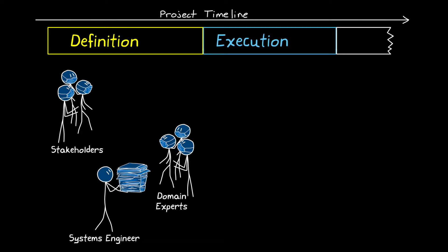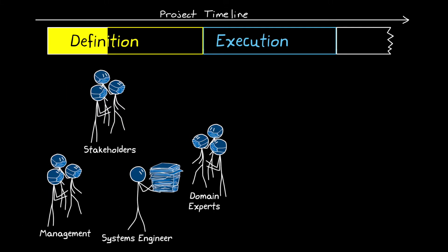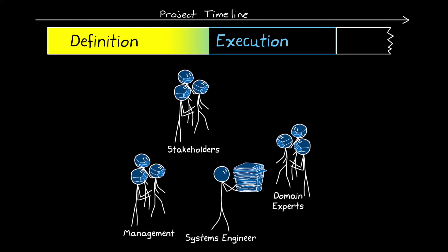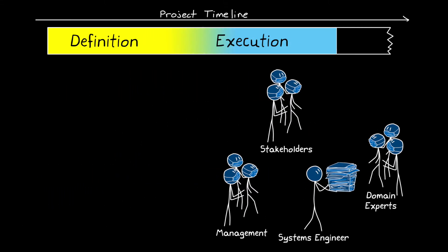And it also can't be done without the stakeholders refining their needs as questions arise, and without management to weigh in on the impact to cost, risk, and schedule. And so rather than a one-time handoff of a completed definition, the transition is more of a fuzzy gradient, as the project and all of the people involved slowly transition from mostly definition into mostly execution.